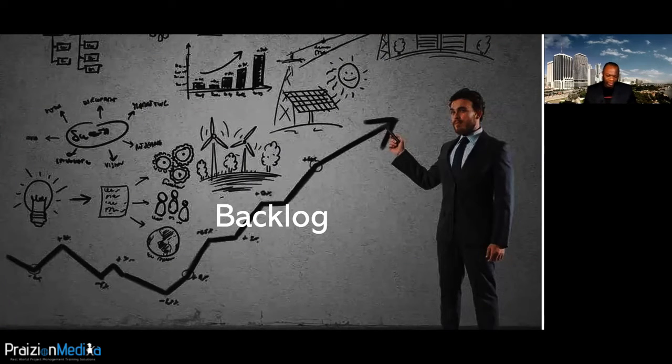So a backlog, typically a product backlog, is a list of the new features, changes to existing features, bug fixes, infrastructure changes, or other activities that a team may deliver in order to achieve a specific outcome. The product backlog is the single authoritative source for things that a team works on. And that means nothing gets done that isn't on the product backlog. The PMI lists this as an ordered list of user-centric requirements that a team maintains for a product.